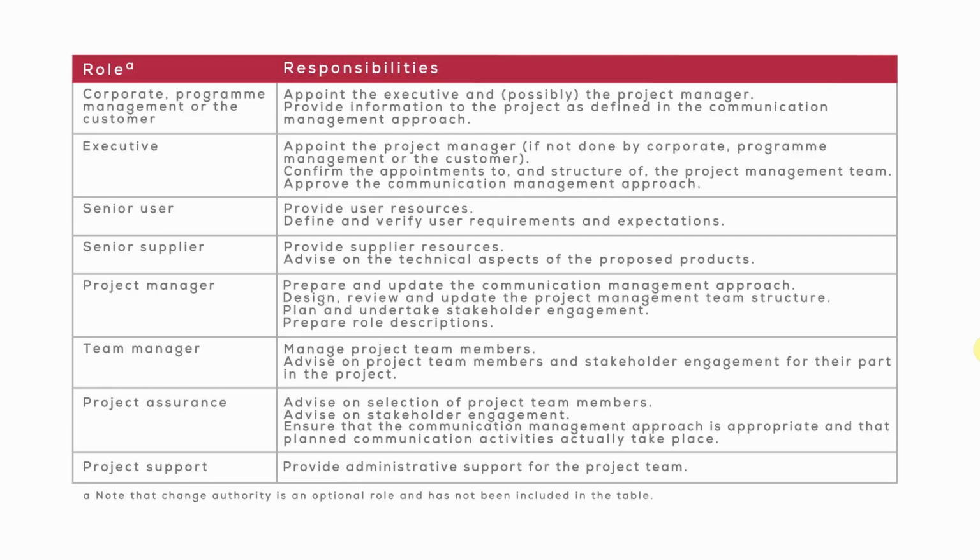Senior user is responsible for providing user resources and will define and verify all of the user requirements and expectations. The senior supplier is responsible for providing supplier resources and advising on technical aspects of the proposed products. Remember, your senior supplier is the technical voice on the project board. They should also be able to provide technical advice in non-technical language to the non-technical members of the project board.